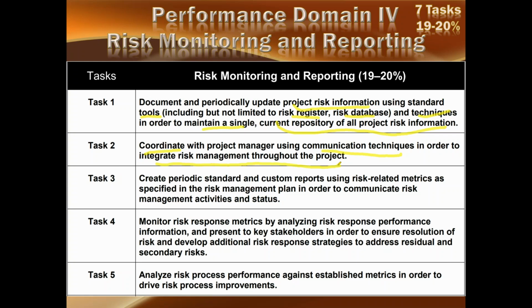Task number 3, create periodic standard and custom reports using risk-related metrics as specified in the risk management plan, because we will be following whatever is written in the risk management plan in order to communicate risk management activities and status. Task number 4, monitor risk response metrics by analyzing risk response performance information and present to key stakeholders in order to ensure resolution of risk and develop additional risk response strategies to address residual and secondary risk.